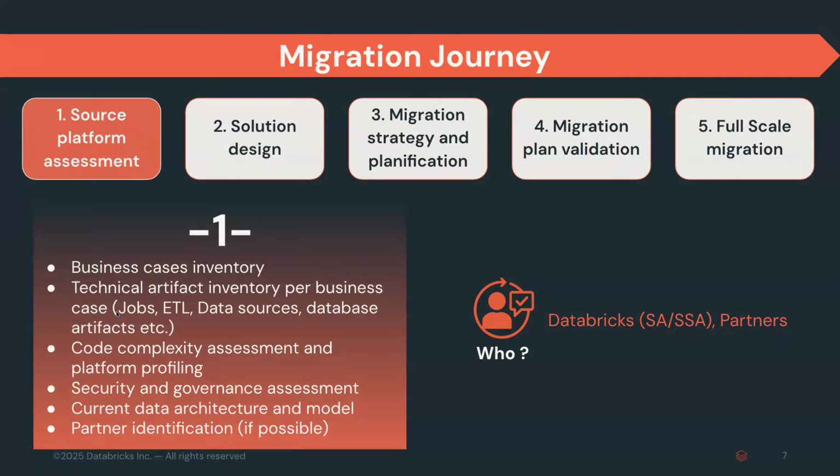We start with source platform assessment. We continue with solution design. Then we do migration strategy and planning, migration plan validation, and full-scale migration, and basically code conversion through our audit.